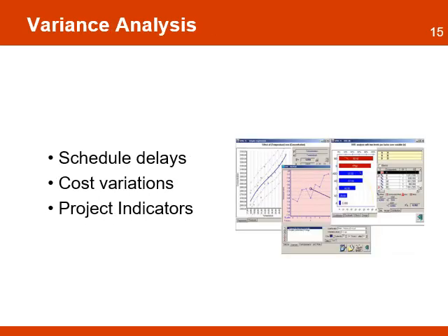One of the first types of analysis the project manager and the project team will do is variance analysis. This analysis compares what has been actually achieved with what the project planned to achieve. For example, the variance analysis will look at the schedule to see if there are any significant delays. Analysis of the budget to see if the costs to date are following the original estimates.